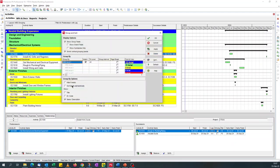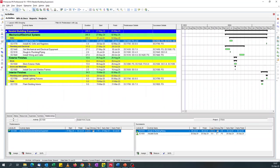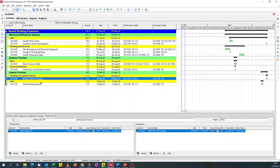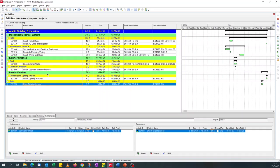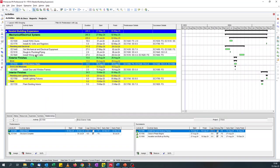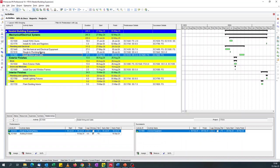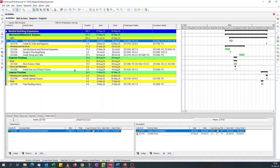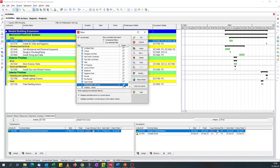We've got the filter applied. If I go to grouping and hide empty WBSs — we've got nine activities with lag. You can check: predecessor has lag, predecessor has lag, and so on for all nine. You can also see a negative lag or lead in there, so the predecessor filter works correctly.